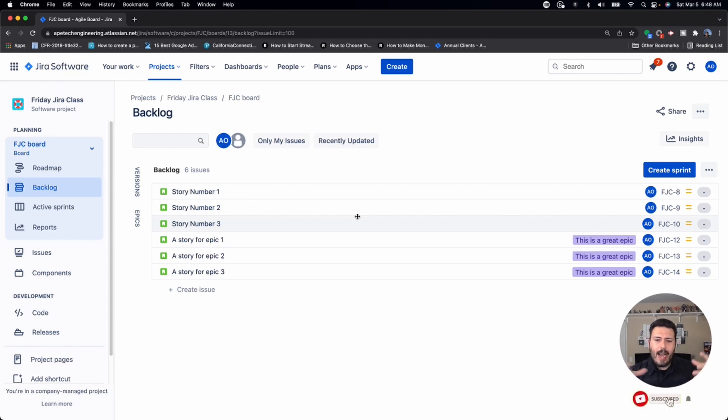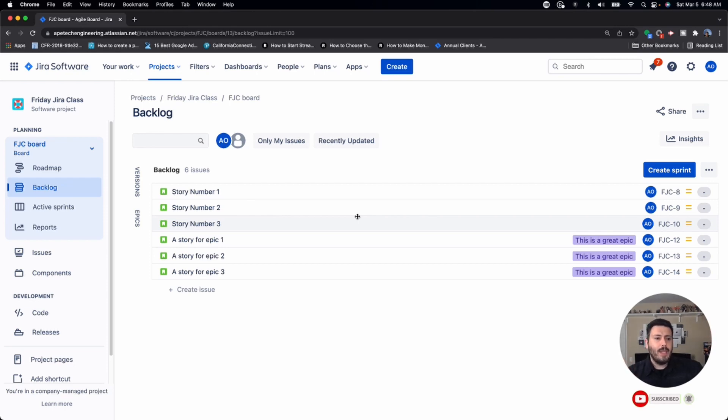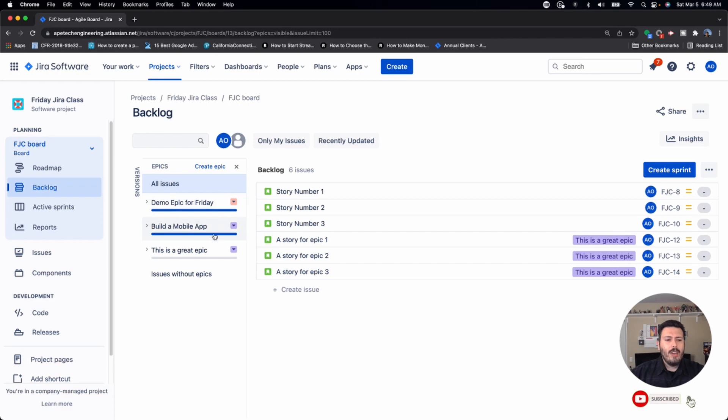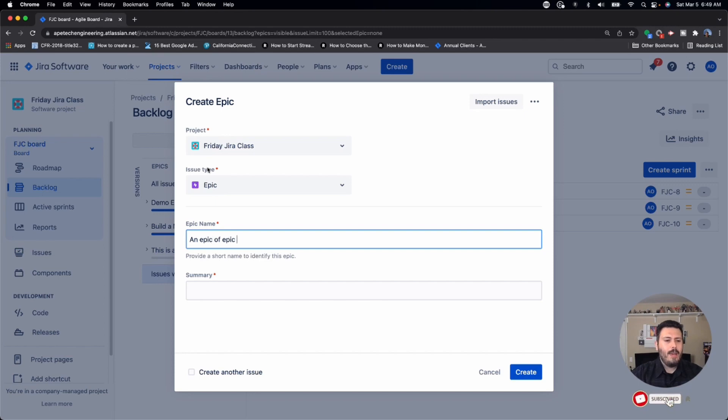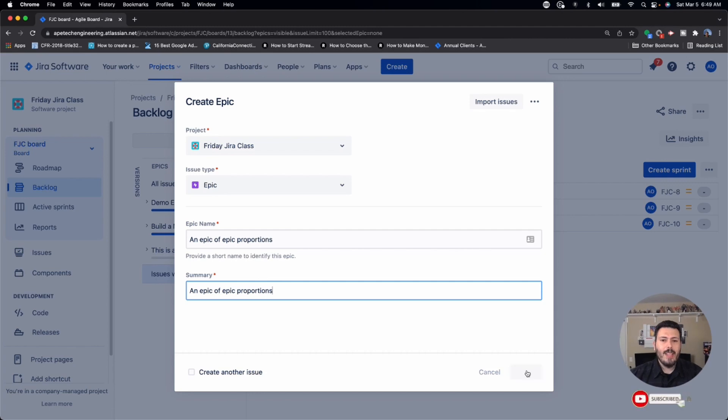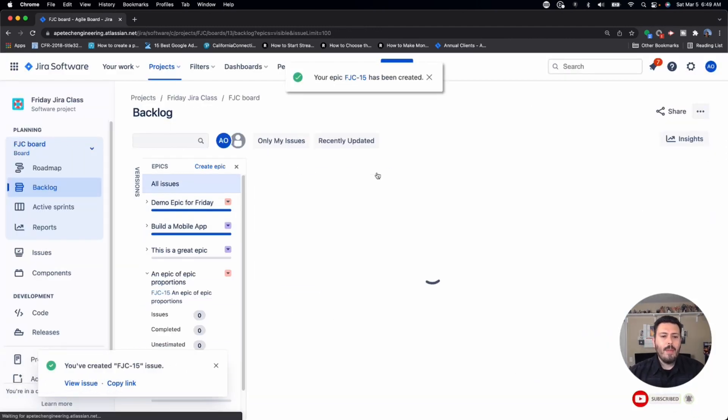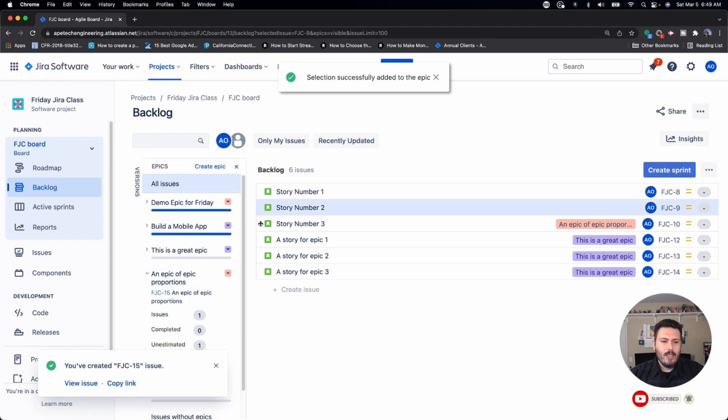When a story is tied to a bigger purpose, aka the epic, then you can see more of the traceability. You can see the company vision, the goal, the product goal. Here's the traceability from the epic down to the story and down to the subtask. So to catch things up, I'm going to create another epic here by clicking on the Create Epic button. I'm going to name it an epic of epic proportions and give it the summary. Now if you haven't seen my video about the difference between epic name and summary, make sure you go watch that video. Coming back here into the backlog, all I'm going to do to associate these issues to my epic is drag and drop them over here.